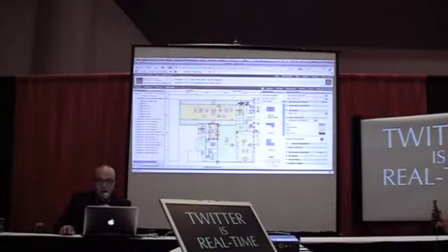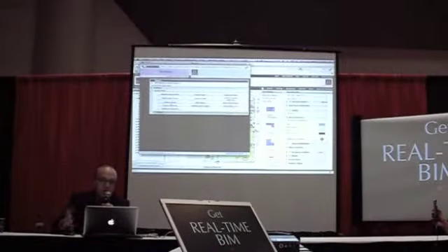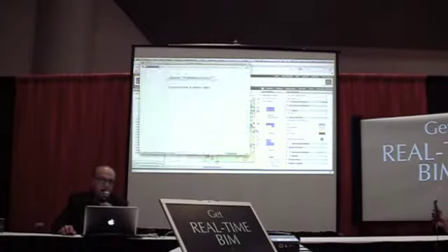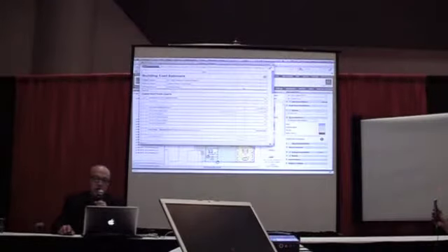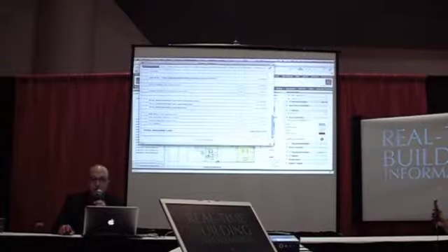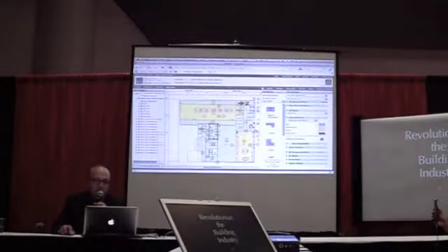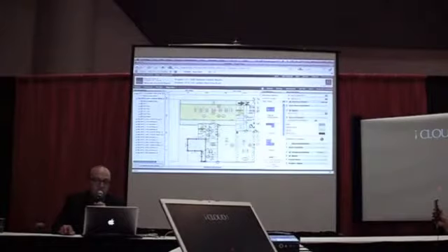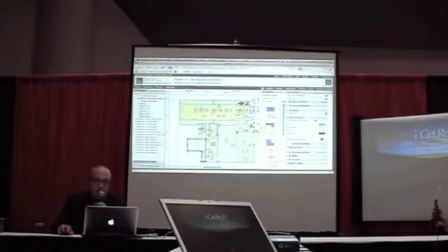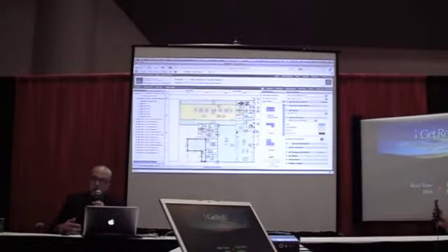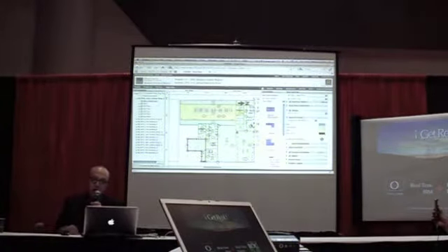So if I go to the reports here, let's assume this is a new building, and you could say, okay, how much is that going to cost? This is early cost estimating based on the things that I put in the building. So this is going to be a $59 million, $393,000 building. If I make this room a little bit bigger and save that, it actually updates that report on square footage, on cost. It's the early stages of design, but we're trying to do what we call create the train wreck.